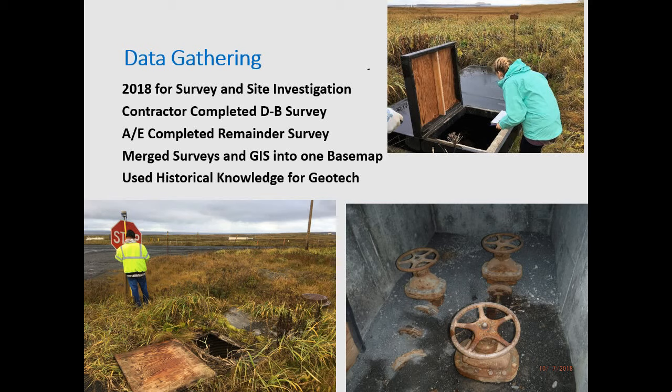We sent out our surveyor, our teaming surveyor. There were multiple projects they were surveying. They were out there for 3.5 weeks. They were working on other projects as well. And to realize those efficiencies, again, due to the high mobilization costs, they were picking up all the other projects that we needed to pick up. So when we were out there the first week and a half with them, we were helping them. We were kind of working ahead of them, finding the valves, identifying them, talking to them at night, saying, hey, this is where we worked, giving them the updated base map, and then they were working with it out there. So it was a really interesting part of the project.